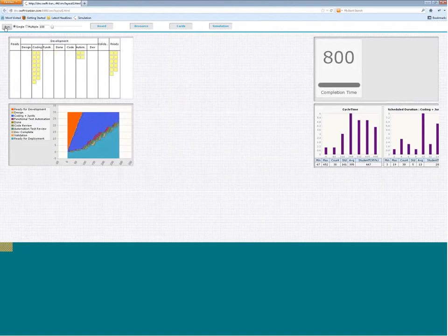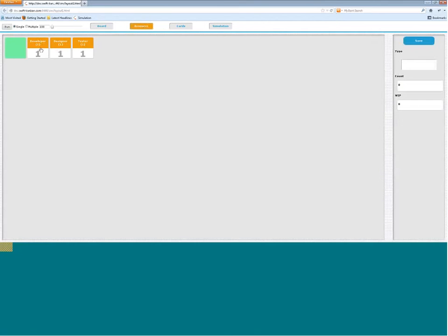So now we know that okay, if within my board I go to my resource team and add, and by the way, as you can notice, we reduced the cycle time without adding a single more resource to the team, right? So you could do that level of optimization just by saying as a policy level who could do what.